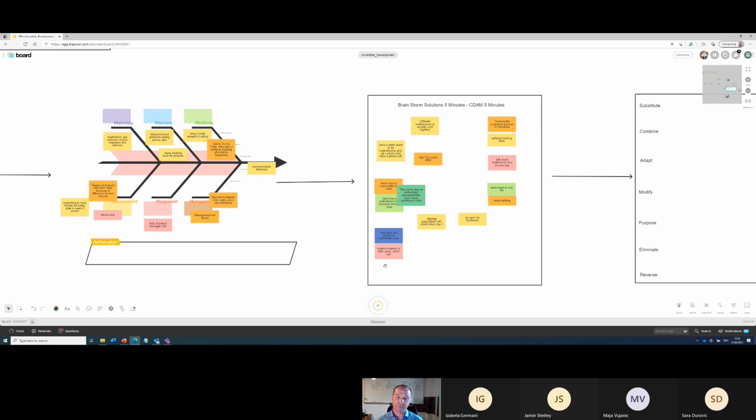If we look at only take one person to coordinate and organize a weekly, daily quick catch-up call, again, we can combine that into one solution. Nominate lead to set up regular call for quick catch-up. See how it's working? As we combine, it becomes a more tangible action.